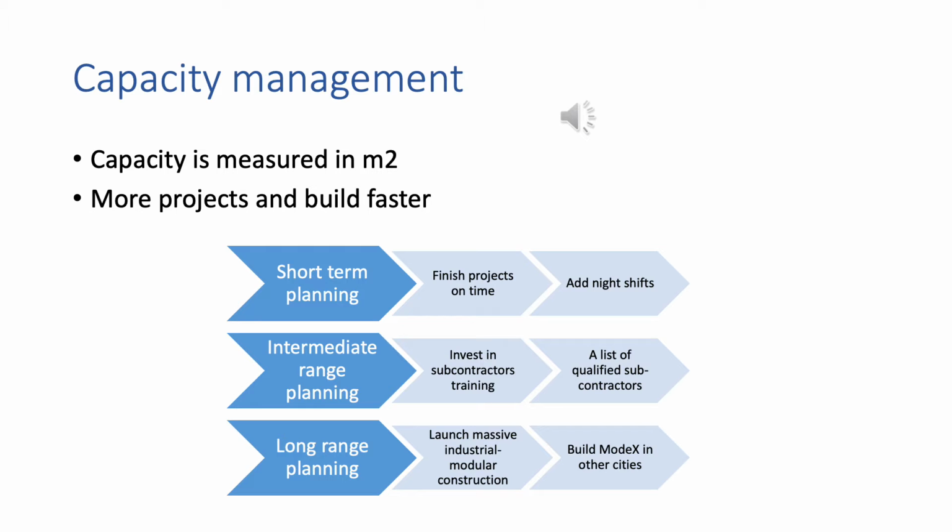In this type of construction, about 80% of construction works would be completed in a factory, and ready models can be assembled on construction fields like Lego. This will allow the company to accomplish projects in 5 to 7 months. Currently BI Group has built a factory called Mode X in Nur-Sultan and is planning to build one in Almaty. In the long term, most of BI Group's apartments will be built by this method.